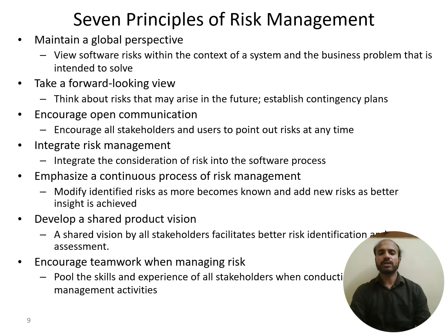Next is to emphasize a continuous process of risk management. So modify identified risks as more becomes known and add new risks as better insight is achieved. So just listing out the risks at the initial stage of the project and stopping is not the right approach.